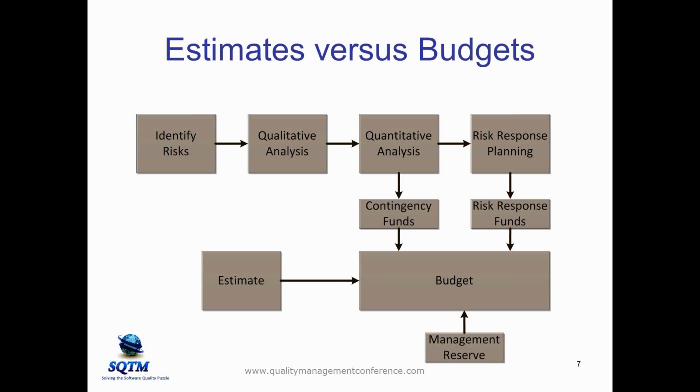The way we reduce that exposure is, number one, by doing risk response planning, so we're looking at mitigation type activities. A classic example that people give is buying insurance. But in the software world, there are a lot of other mitigation activities we can do as well. We can hire high-priced consultants to provide expert guidance at some critical points in time. We can have face-to-face interface control working meetings to help with some of those interfaces. There's a lot of mitigation work that's really designed to reduce risk.